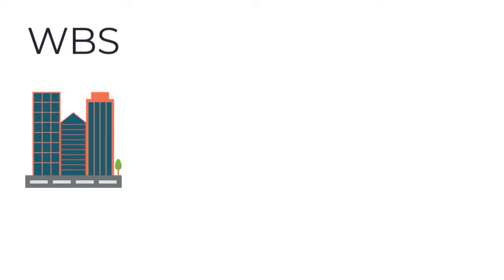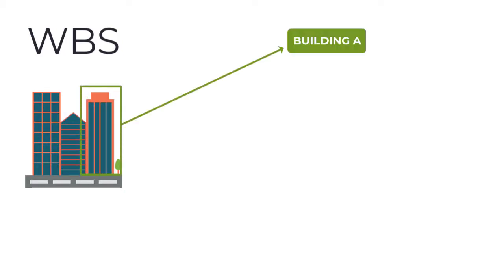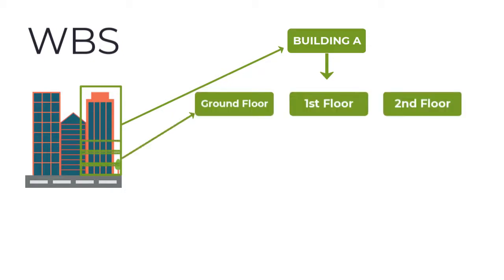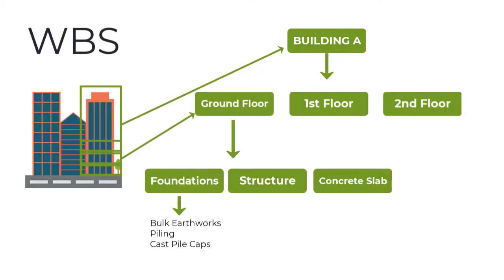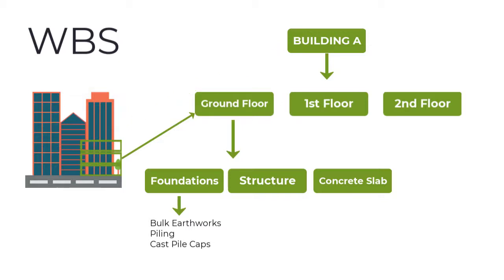Work breakdown structure essentially facilitates two functions for us in scheduling. The first one is it subdivides our project scope into smaller components, into project deliverables or work breakdown packages, which is just more manageable components. What makes this step complex is the fact that there are many ways in which we can facilitate this breakdown. Some ways are very comfortable and help your project, and others are uncomfortable, unstructured, and don't support your project effectively.